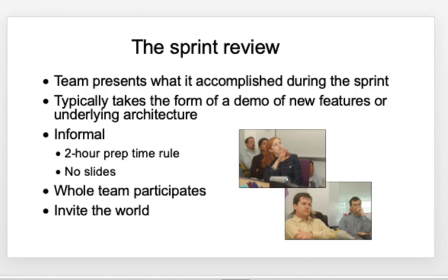So as far as possible, no slides should be used. It could be an informal presentation, and it's a 2-hour preparation time rule. The whole team participates and the entire world is invited. So when I say invite the world, whoever is interested or would be interested in your product is welcome for the sprint review.